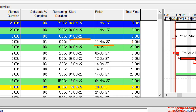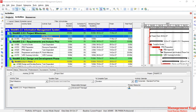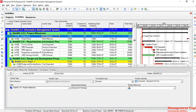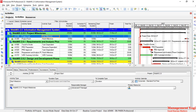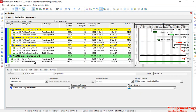For the start milestone we have the 4th of October; the other date fields are empty. The float will be zero because milestones are considered part of the critical path. Milestones are displayed as a black diamond shape on the Gantt chart.